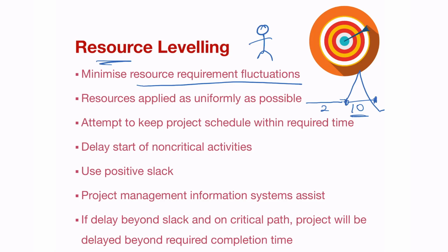Why don't you want that? Or why is that such a problem? Because you're suddenly going to need extra people for a very short space of time. You have to bring them in. They might not understand the project processes. They might need time to acclimatize. And you might not have the resources to supervise a large group of people. And once you have a large group of people all working on something at the same time, there is an opportunity for mistakes to be made.